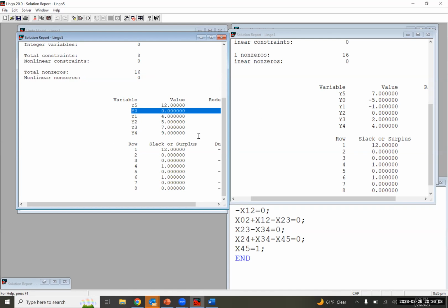Okay, because like I said, in general, the optimal solution values, I mean the y variable values in the optimal solution, can assume any values between the early start time for each event and the latest time for each event.